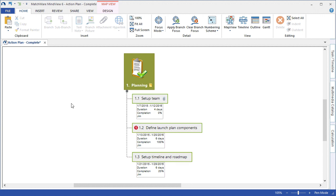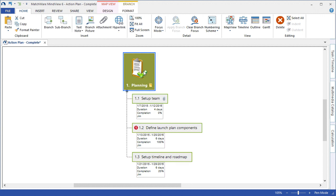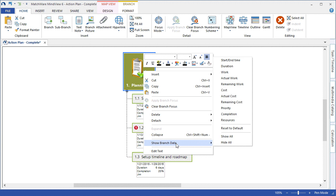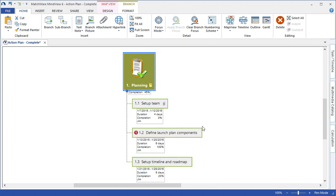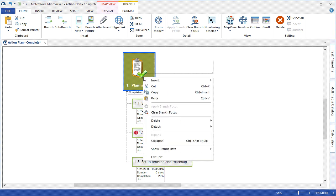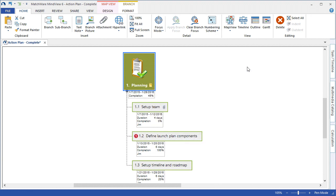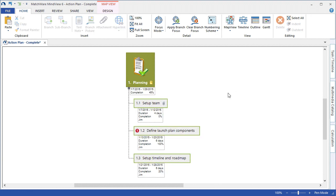As you can see, each individual task has its corresponding data listed below. If I take a look at the Planning Parent branch, I can choose to summarize information by displaying task information such as the completion level and possibly the full start and end date of the particular sub-items. This is an extremely effective method for seeing both the high-level and low-level items within a project or action plan.